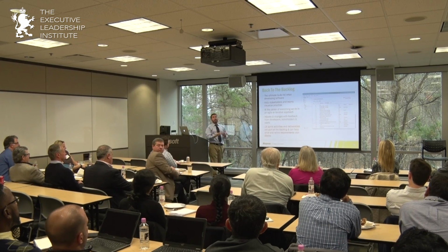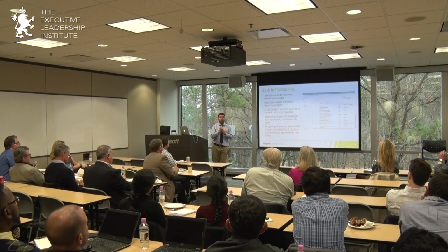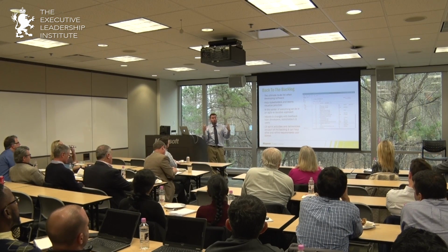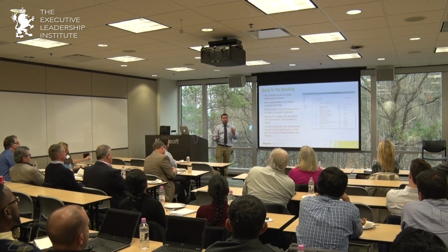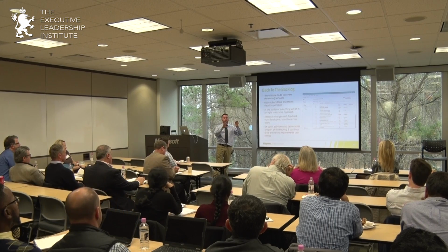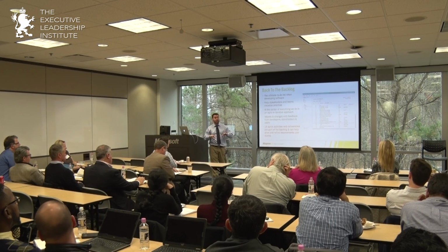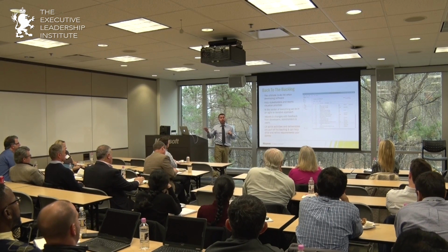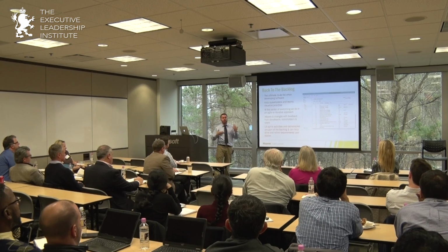So planning poker is a way for the product owners, the development team, everybody basically involved in crafting the software, when you're looking at fleshing out and grooming that backlog. When I say grooming, taking a look at all those different user stories and prioritizing them and figuring out what the estimate is for them to be built, right? You might have 2 user stories that are going to take an entire sprint, but you might have 10 user stories that you can do all of in one sprint. So those are some of the prioritizations.